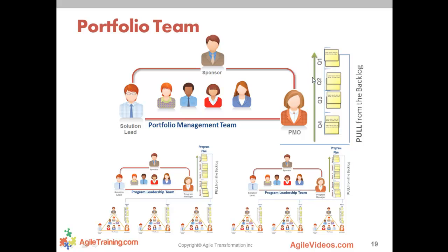In Agile, we welcome change. Change is the norm. Change is not the exception. And we believe that as long as you slice things into smaller chunks, and the team's going to pull the top item, feel free to continue to change the bottom part. Move your deliverables up and down based on your priority. But once a team pulls a small deliverable, it would be great if they could get the focus to actually finish it, so they're not starting more than they can actually finish.